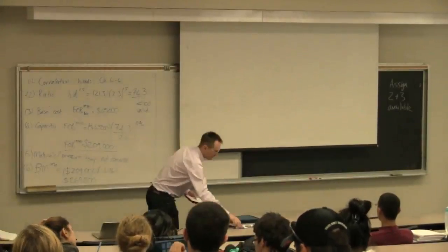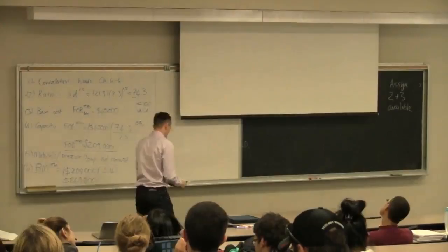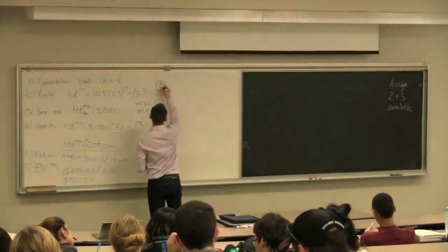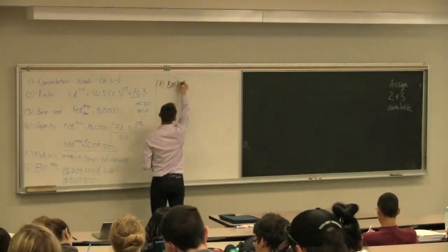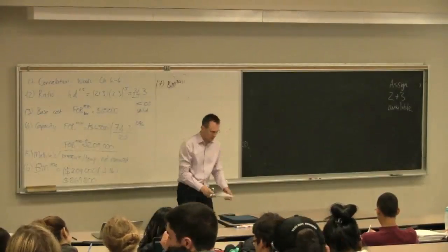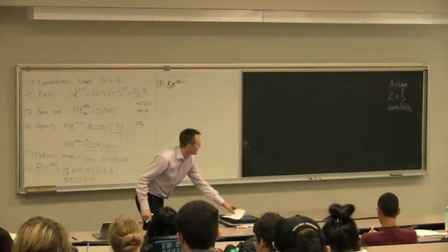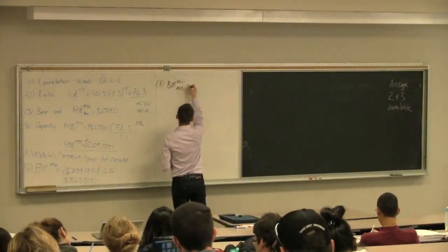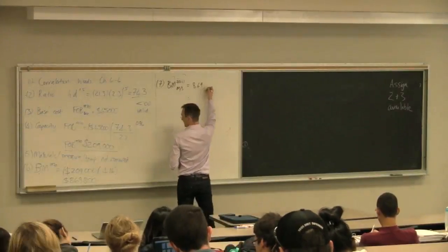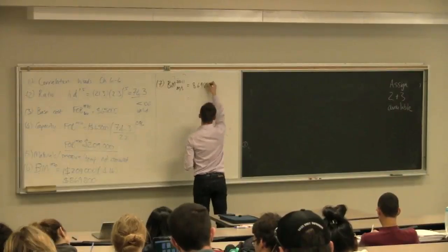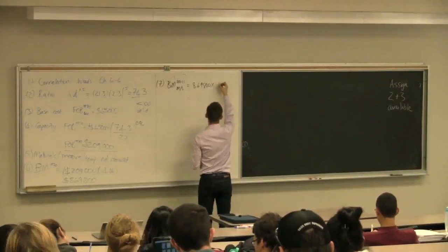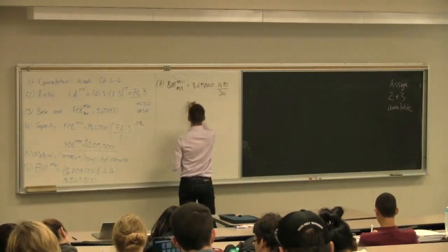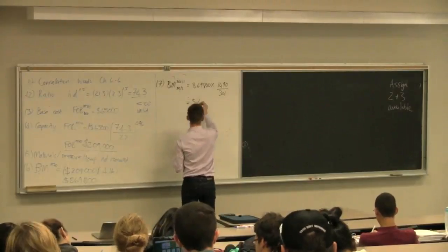And the final parts are just to inflate to today's dollars. So step 6, 7. To get the bare module cost in 2011, I've used 2011 over here this time. Based on the Marshall and Swift index, that would be 869,800 multiplied by 1490 divided by 301. That gets you a cost of 4.3 million.